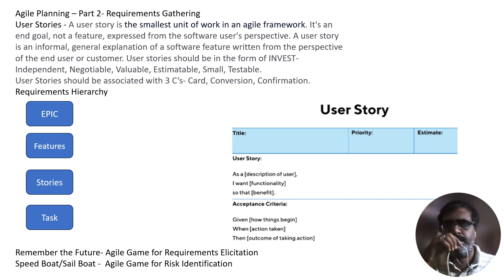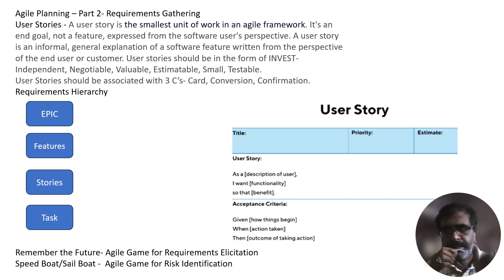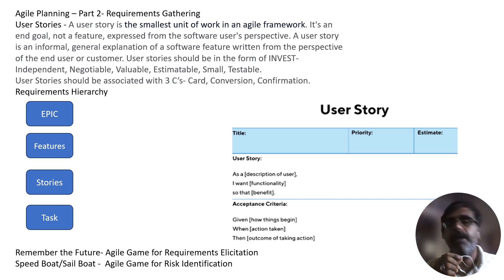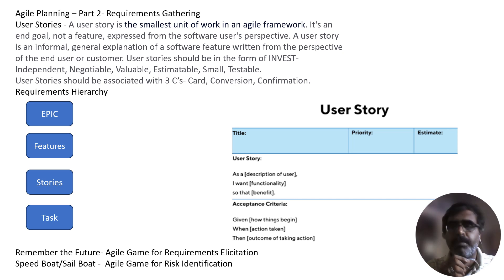Requirements are generally written as user stories. What is a user story? User stories are big, bite-sized, understandable chunks of business functionality. These are the preferred way of documenting requirements in Agile. Like a soya chunk, user stories are split into small parts. The most commonly used format for making a user story uses three pieces of information: role, functionality, and business benefit. We can describe it as: As a role, I want functionality so that the business will benefit.